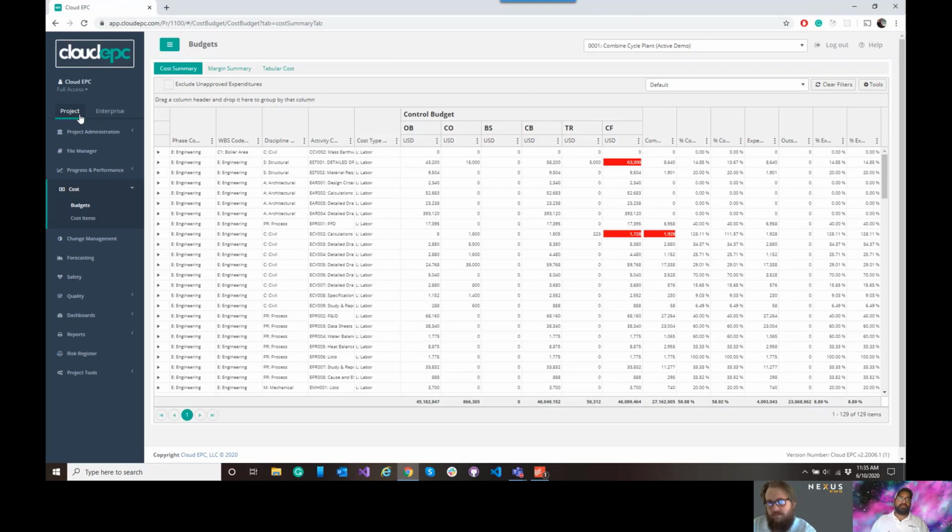And so if we think about a traditional WBS hierarchy, it's very much that, a hierarchy. It builds from a level 0 down to a level 1, down to a level 2. But in our world of having to report and slice and dice data, we needed something that was a little bit different. And quite frankly, what we needed is what most people will do in systems, which is we needed a pivot table. They'll take that hierarchical structure, bring it down into an Excel file, create codes, and then pivot that data into something slightly different. It's at the end of the day the same underlying data, but it's getting aggregated in a different way.